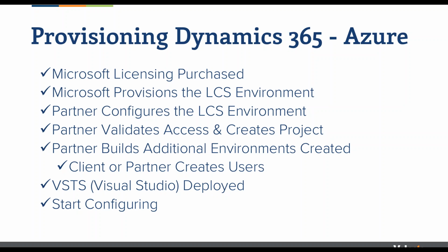Once the licenses are purchased, the next thing that would happen is we would provision an LCS environment. LCS stands for Lifecycle Services. And you can see here now that we would also configure that environment. LCS is kind of the launching point for where we will configure your environments, and also where we will create SharePoint, where we will store your test scripts, and you'll have access to data and code. It's kind of, if you will, a library of all of the information that's needed for your project. So launching your LCS environment is a pretty critical step.